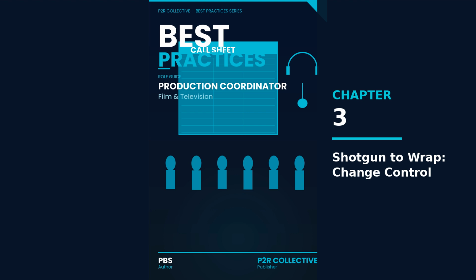3. You treat holds like they'll end on schedule. You log the hold but you don't control the unhold moment. When approval lands, nobody knows what to restart, what needs a reset, or who owns the restart call. Do this: create a clear restart trigger in your change log. The unhold call must come from production with an updated effective time. Before you restart, rerun the loop, confirm affected items, and publish the updated truth version immediately. Not this: we'll start again when the approval comes in. You lose time because you don't control the moment work becomes valid.